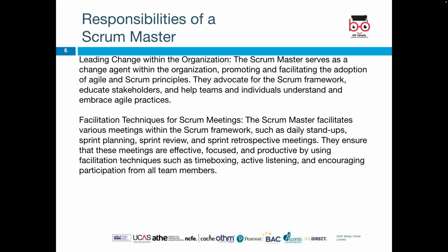And then they facilitate techniques for Scrum meetings. They are responsible for holding stand-ups, the daily stand-ups. A stand-up can be a morning meeting or an afternoon meeting that you have in a team, whereby each member talks about what they did the previous day, what they'll be doing that day, and how they can progress, and if they have any shortcomings. So that's what the stand-up is for. It is used for understanding what the team is lacking and how the team can progress.